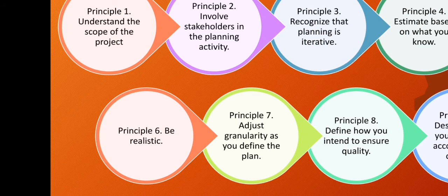Principle six: be realistic — people don't work 100% of every day and they can make mistakes. Principle seven: adjust granularity as you define the plan. Granularity refers to the level of detail that is introduced as a project plan is developed — it may be high or low.